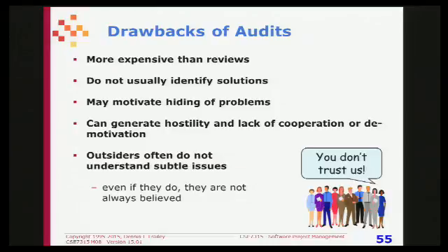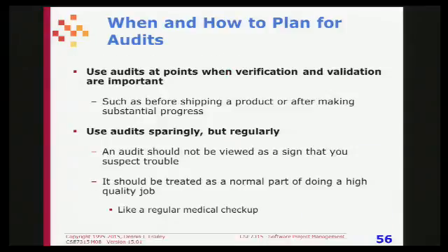Because if you tell your software staff, we're going to audit you, their immediate reaction is, why? What are we doing wrong? You don't trust us. One of the best ways around that is to make it part of your process. We always do an audit when we get to such and such a step. And I've seen organizations where they're proud to be audited because they know they'll look good. But that's a cultural thing, very much a cultural thing.